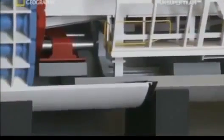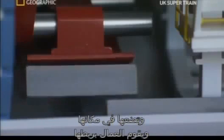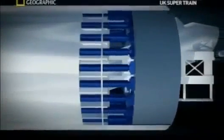Even concrete segments have to be handled gently. Chipping opens channels for water. The segment erector uses vacuum suction. It picks up the individual segments for the ring, places them in position, and the miners bolt them together. And once the ring is complete, the rams can then move against the last ring built and start the cycle all over again.